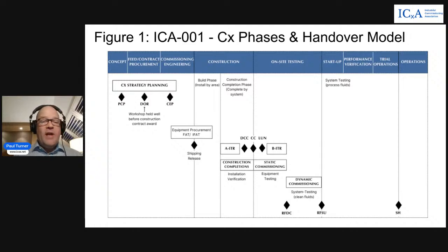A lot of projects will try to do that integration later in the project, and that usually causes a lot of delays because you've pushed a lot of risk to later in your project. But complex control and protection systems need to be fully checked out, hardware and software, in the factory before shipping release is indicated, before equipment is shipped to site. Construction will proceed. The construction folks, like I mentioned earlier, will focus on optimizing their construction workflows, and we need to allow them to do that, because construction is certainly a big aspect of projects and involves a lot of expensive equipment and large labor workforces, and we need to allow them to optimize all of that to proceed with their installation activities.